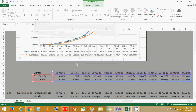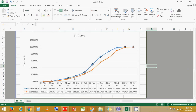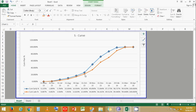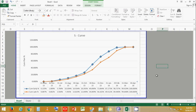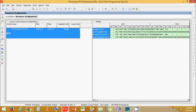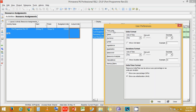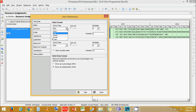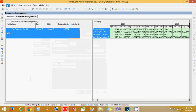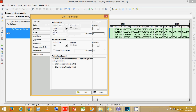Now select Cumulative Early Percentage, go to Sheet 1, and paste using Paste Special — Values and Number Formats. Do the same for Cumulative Late Percentage. Then add this data to the existing graph by selecting Add, choosing Cumulative Late Percentage, and selecting the data. Now you'll see both the early plan percentage and the late plan percentage on the chart. One final important thing to remember: go to Edit, then User Preferences, then Time Units — make sure you choose the correct time units based on your project, client, or company requirements. You can choose Man Days or Man Hours for your labor unit display. Thank you for watching, until next time.